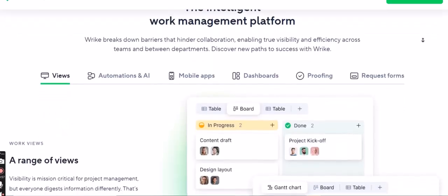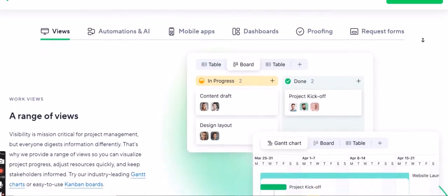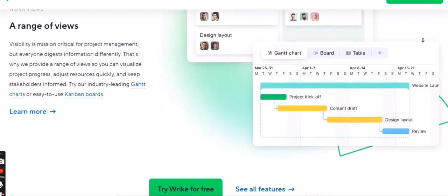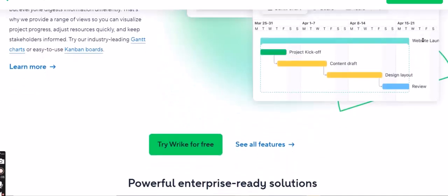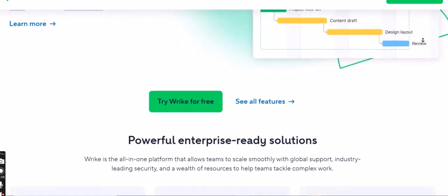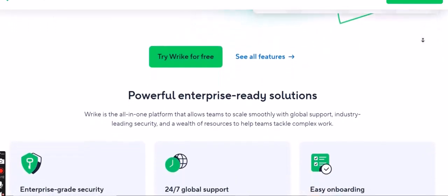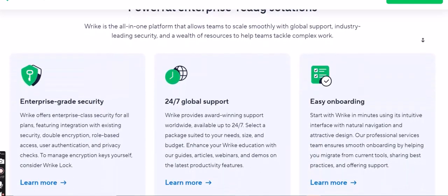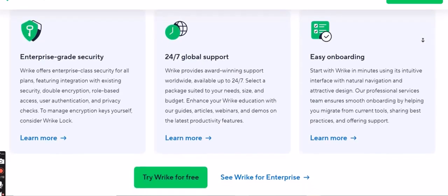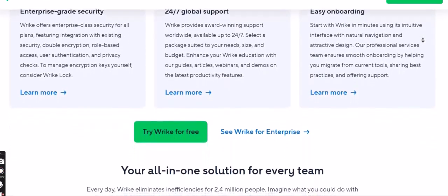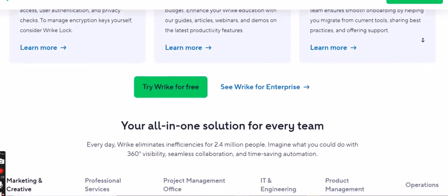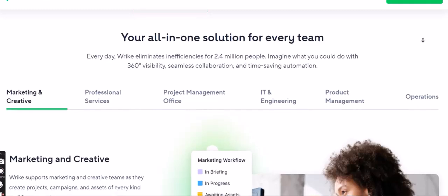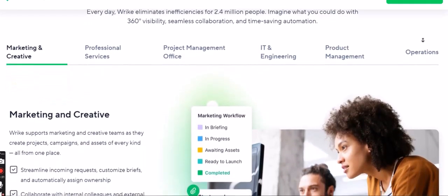Finish to finish, FF. Task B cannot finish until task A is finished. Both tasks must conclude together. An example could be finalizing the marketing materials, task A, and updating the website with those materials, task B. Both need to be completed before the campaign launch. Start to finish, SF. Task B cannot finish until task A has started. This type of dependency is less common but can be useful in specific scenarios. For instance, a project handover, task B, cannot be completed until the initial phase of the project, task A, has begun.